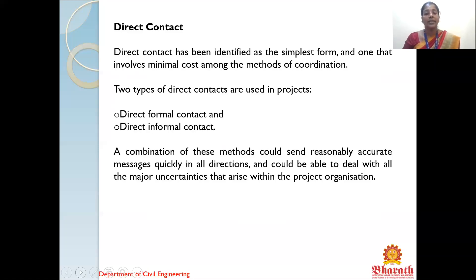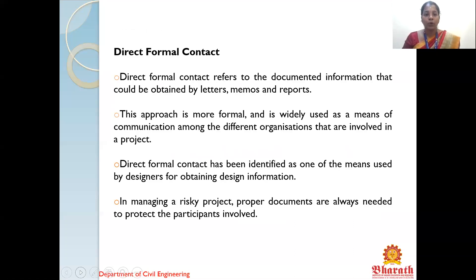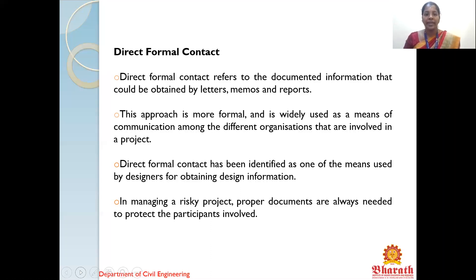Direct formal contact refers to documented information sent through letters, memos, and reports. This approach is more formal and is widely used as a means of communication among different organizations involved in the project — such as architects, project managers, and contractors. Direct formal contact has been identified as one of the means used by designers for obtaining design information. In managing a risky project, proper documents are always needed to protect the participants involved, and these contact memos or letters should be filed for future reference.